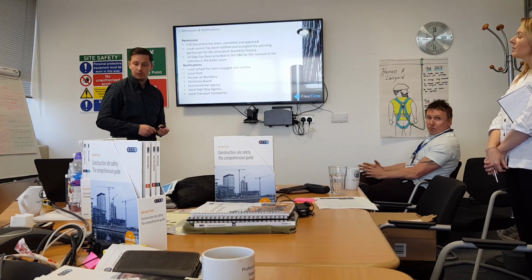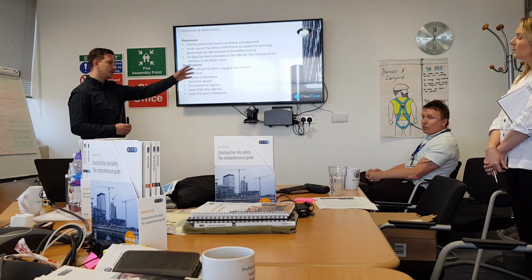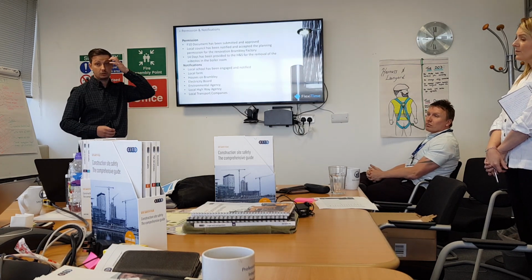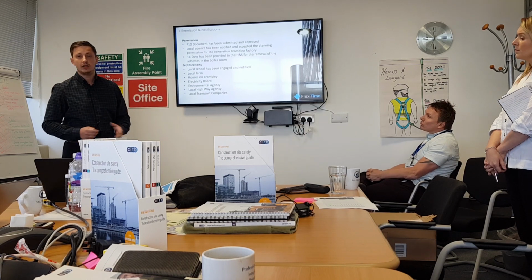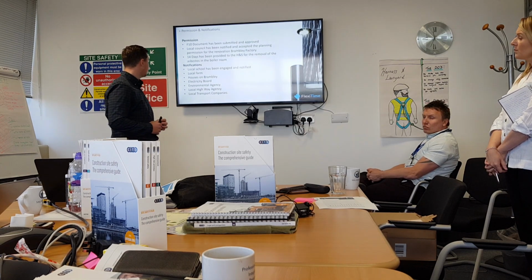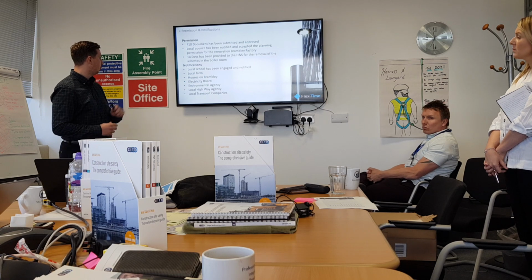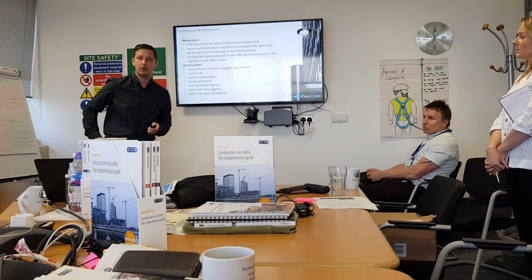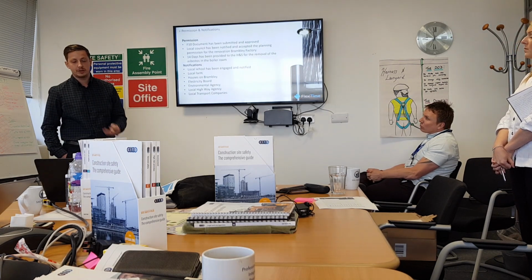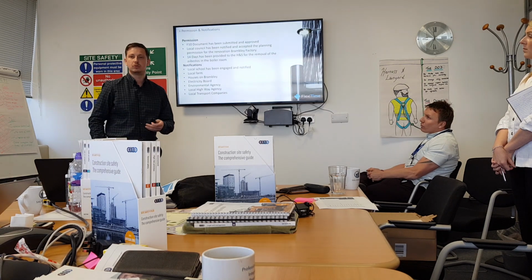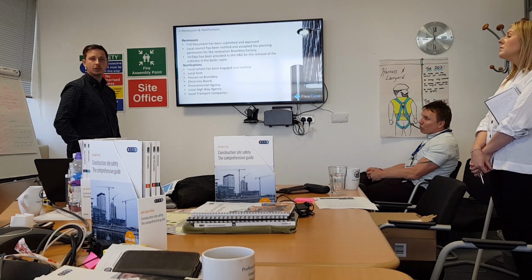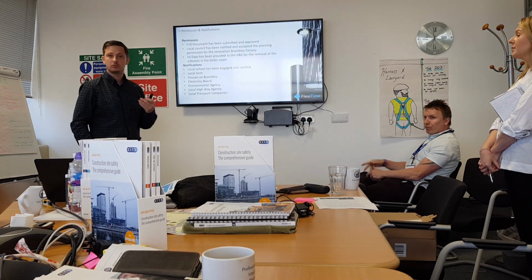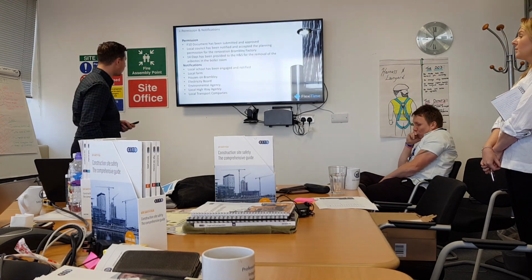The houses at Bramley as well, again, if you remember the site plan, there were some new houses and some current houses across from site. We've made all the residents aware. They do have a contact to speak to if there's any issues. The electricity board's been notified as well due to the overhead power lines. To be honest with you, we've done it as a formality, but we won't need to because we've got a strict height procedure in place and no plant over 8 metres is allowed on site.